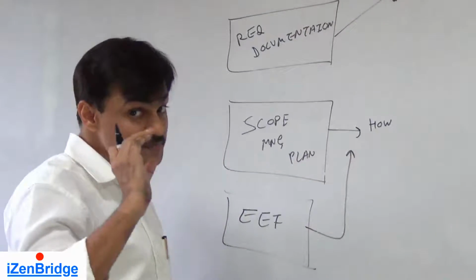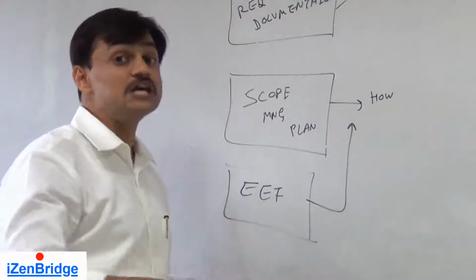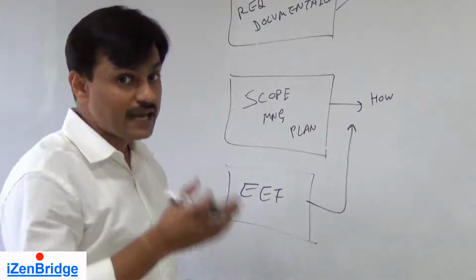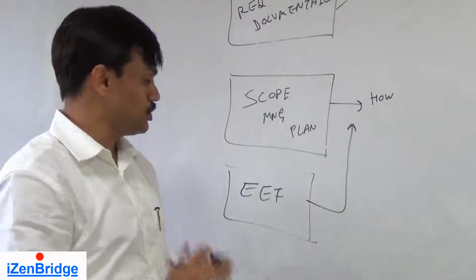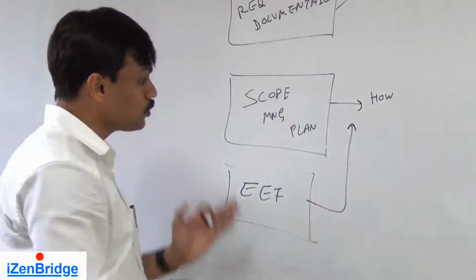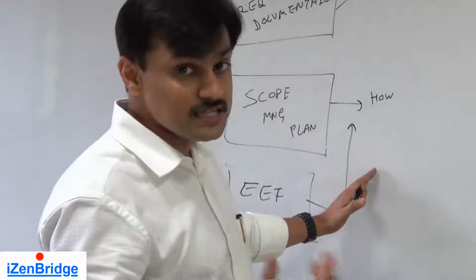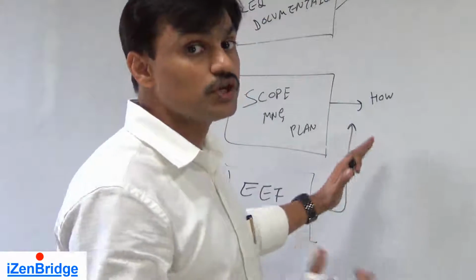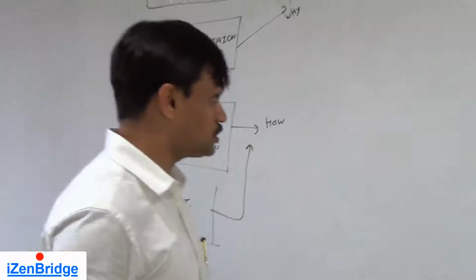For example, you have a specific need but that material is not available, so you need to go with an alternative option even though the need is not 100% met because of this alternative. But if you have an environmental condition, you may need to take that option. So you need to take environmental factors, which will bring constraints or tell about the surrounding atmosphere required when you plan the scope.